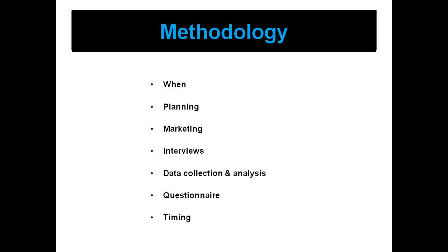being conducted 12 months after the building's completed, and that's because we've done a full year of seasons. We've gone through summer, winter, autumn, and spring. The commissioning period's completed. The building should be operating correctly, and all the services should be now tweaked to suit the occupants and the environment and the climate.